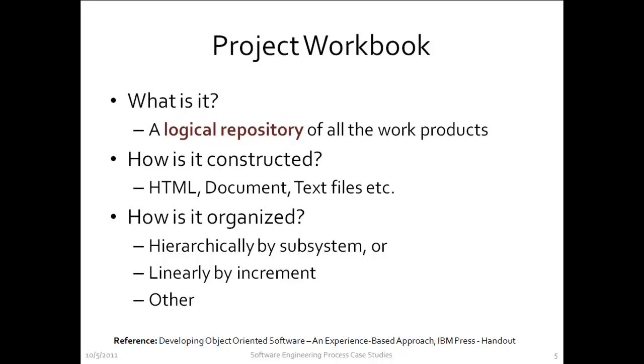And how might it be structured or organized? Well, you might structure a workbook by subsystem. So let's say you're building a large system and it's broken up into multiple subsystems. You could have a workbook for the whole system linked to sub workbooks for the subsystems within that system. Or they might be organized by increment. So for the first increment, you have a workbook. For the second increment, you have a workbook. For the third increment, you have a workbook, consisting of all the documents, requirements documents, project management documents, source code, all of those things.